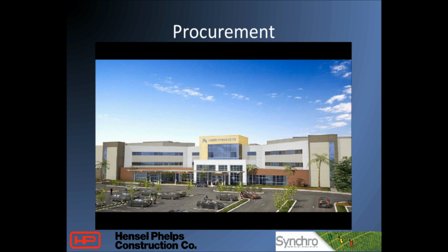You QC your schedule. I mean, visually, you run that sequence, and if there's something out of logic, or it doesn't make sense, it's right there in your face, right? And with every schedule, the first reaction that I get from the superintendents is, Synchro, there's something wrong with Synchro. And then we go back and look at the dates, and sure, there's a bust in the logic. So, a great QC tool, a great tool for communication, intuitive.